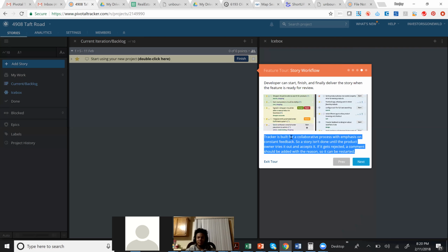Right. In these 8 hours, I want these 4 tasks or user stories done, and this is how I'm going to test it. And either I'm going to accept it or reject it. And then when you're rejecting a lot of user stories by a certain person, you can then start testing the quality of how many of this guy's tasks came under rejection, and now you're tracking people's performance also.